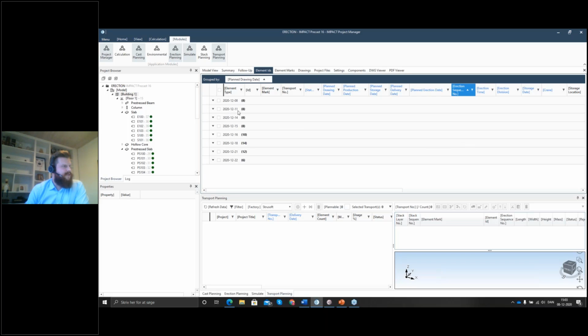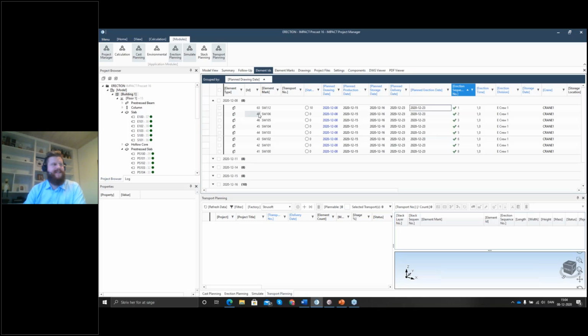And then I can relax a little bit, because for the other ones that we need to erect after the Christmas holidays, I actually have a little more time. So instead of having only one more day to finish the drawing, I have a few days. That means the other batch of 8 drawings I don't need to finish until the 11th, of course. This is just in this case. Hopefully you won't spend 3 days making 8 elements; hopefully you will spend 3 hours or less. But this is just one way of filtering it out, combining these different things together.